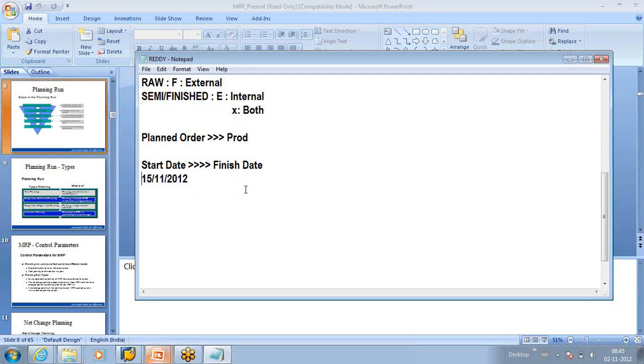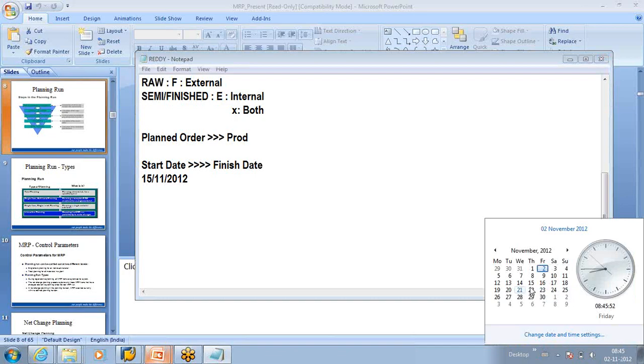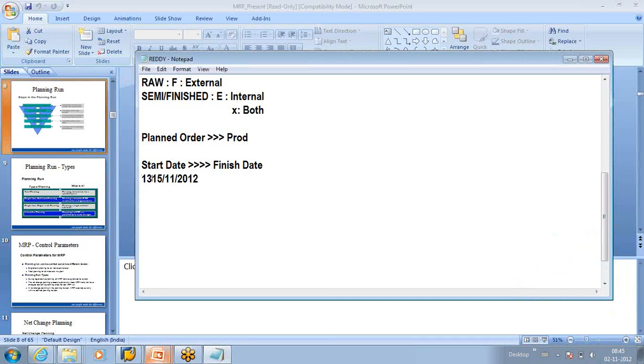That is the question. If it takes 2 or 3 days, whichever it is, suppose I'm taking 2 days as the production time. If I want to finish it by the 15th, I have to take my start date as the 13th itself. 13 plus 2 days is equal to 15. This is my production start date. If the production start date is this, the finish date should be this. But it is not so simple as I'm explaining, just 15th minus 2 days.